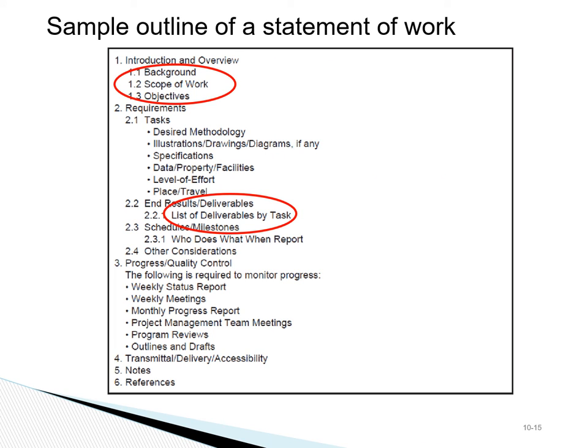An accurate and complete statement of work is critical for successful contracting. This slide shows a sample outline for a SOW — statement of work. Note that all deliverables by tasks need to be listed in the SOW to make sure it's complete. It lists all the tasks; otherwise, anything left out can be disputed by contractors as not part of the contract, and rightfully so.